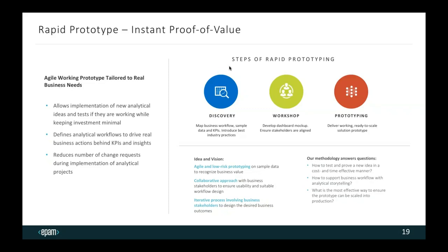This will not perfectly fit. What you can do there, though, is to time box them, to set a limit to make sure this is on topic. It doesn't become an encyclopedic research. Why is that also relevant? Because in rapid prototyping, you also want to identify what you can quickly deliver, right? It's all about time to value, actually.